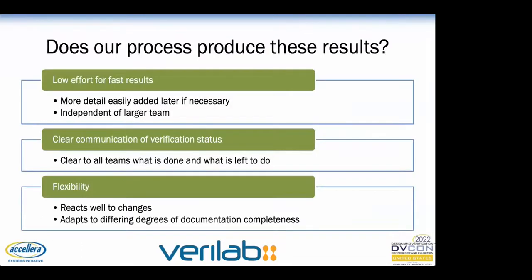By grouping work into deliverables and then focusing on those deliverables as the fundamental unit for verification scheduling, we greatly reduce the number of units we need to work with when planning. Performing the first pass of estimation and scheduling should only take a couple of days. More detail will be needed as we begin to work on the deliverables, but that work can be done after a rough schedule has been produced and reviewed.